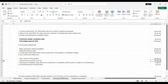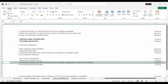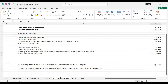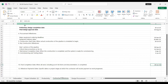The 14th of February marks the major golden welding points — when major sections of pipeline are interconnected. This is a key milestone. Mechanical completion date is when construction is completed and the system is ready for commissioning — 5th of April. Then commissioning and testing date, and finally the handover date. So it's a complete one-year project with everything mapped out.